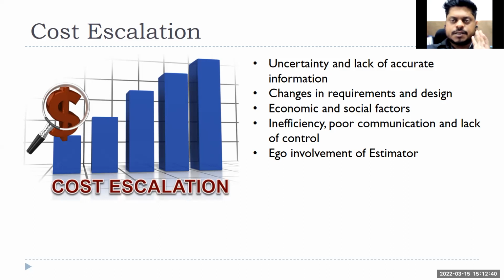But changes in scope, changes in requirement will be there. The only thing is how you, as a project manager, are going to handle it. One major point is to never work on the changes without proper approval, because in the beginning somebody has given you a certain scope, and in most internal projects, you will find difficulty.